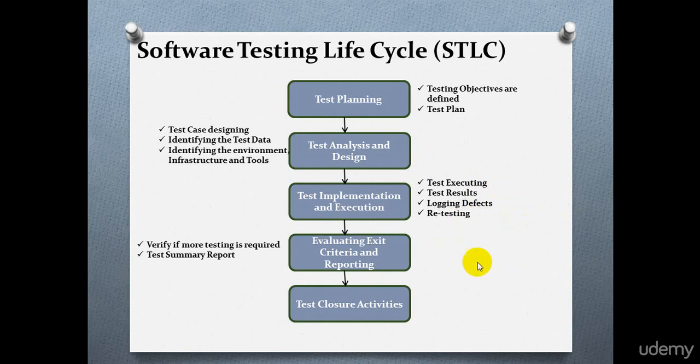And the last phase of software testing lifecycle is test closure activities. In this phase, the test environment is cleaned up and restored to the default state. The process review meetings are done and lessons learned are documented. Data from completed test activities are also archived for future reference.